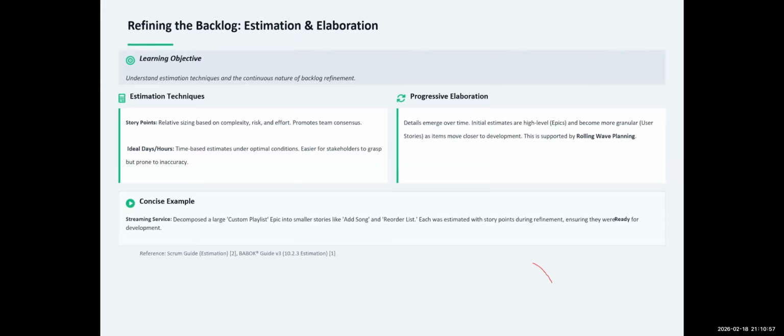Okay. Now, just to add one more thing to it. When you do backlog refinement, it also helps you establish what we call DOR, the definition of ready. That is, this particular item is ready to be moved, to be delivered, or move closer to development, or move into a sprint for those who practice agile. So when you do refinement, you look at items that are clear in terms of the dependencies around them or blockers. You can say, oh no, with this one, if you pick this particular item, we can deliver it quickly.